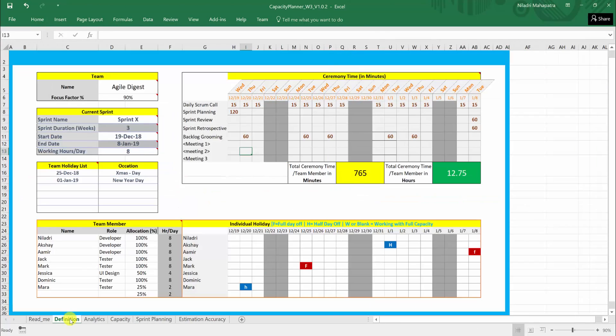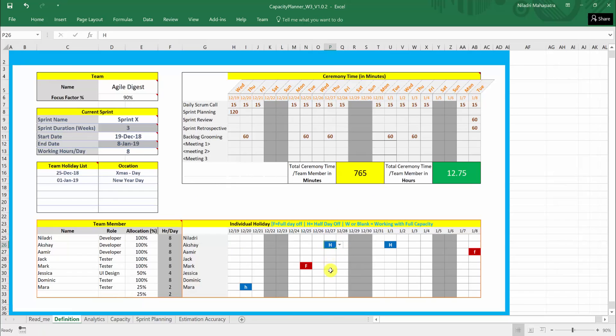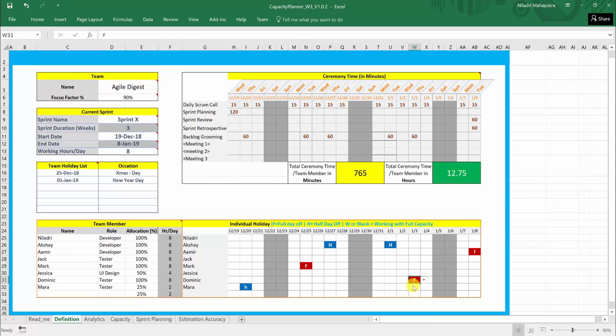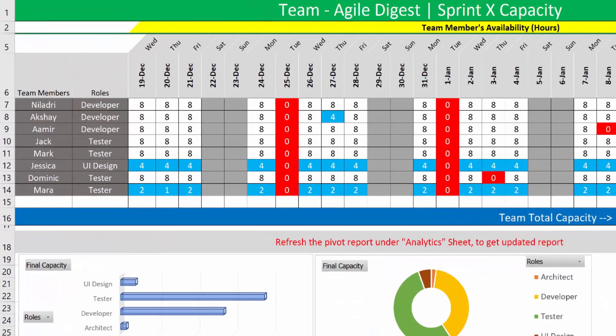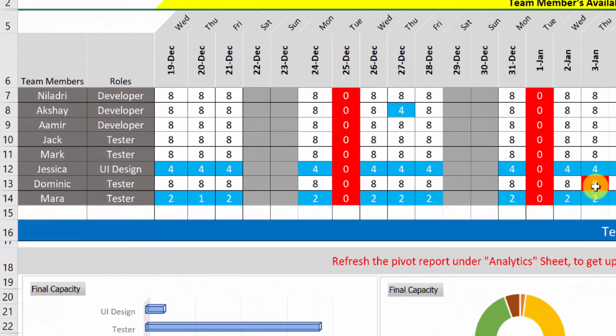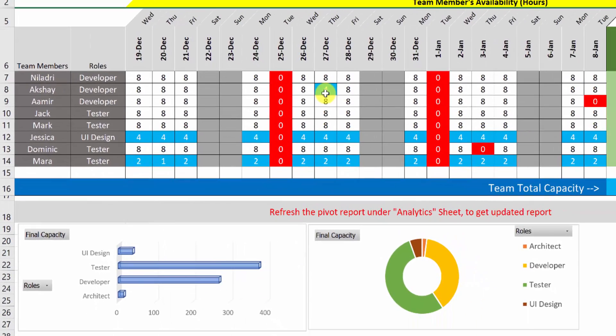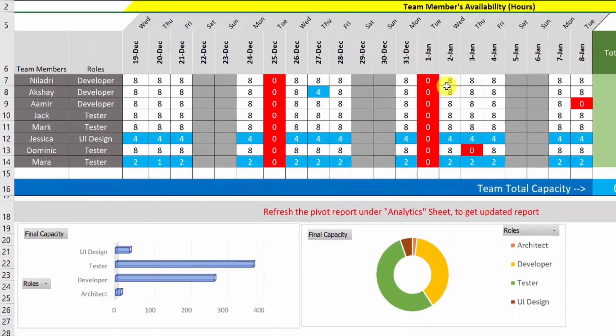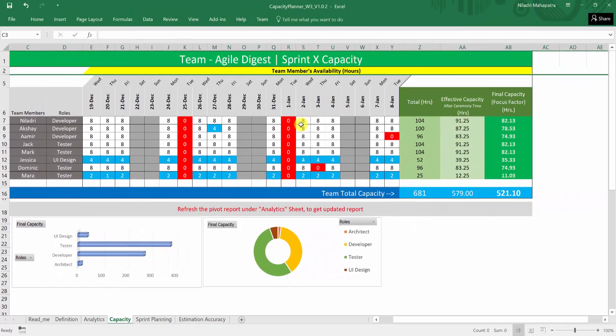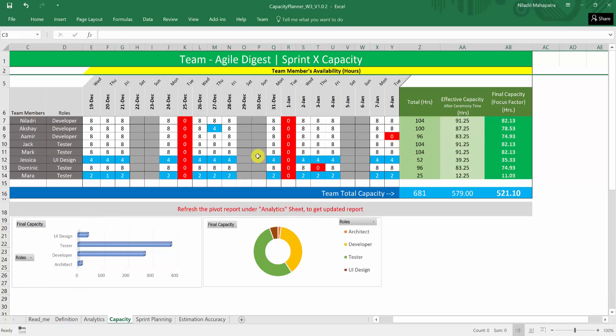So let us see I am taking one half day for Akshay over here and one full day for Mara or anyone else. Let us say Dominic and I will say full day here. So these are the off they are taking. If I go back to capacity I will see Dominic has a full day off here and Akshay has a half day off here. So that is how your capacity is planned. This is a read only seat. So you will not be able to make any change. If you want to get any changes here, you need to change on your definition seat. This is give you a final output and representation.